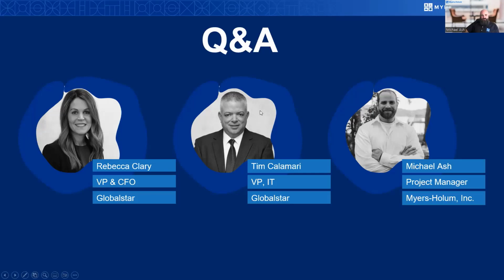The discovery sessions, the first part of the project, are critical. It ties into subject matter expert involvement early. If you get halfway through a project and then finally bring on the subject matter expert and they tell you we're not doing it the right way, we have to make changes, that of course will impact your project. So getting the right people at the right time, early and often, is critical. Those are probably the biggest impactors: the complexity of the project, and of course the engagement.